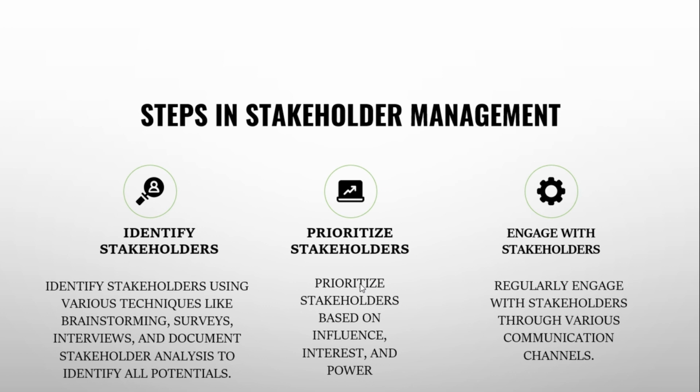We need to label the stakeholder by portfolio. We need to identify stakeholders by the level of influence and interest, which takes us to prioritizing a stakeholder into their level of interest and influence, or interest and power. That is where the power interest grid comes in.